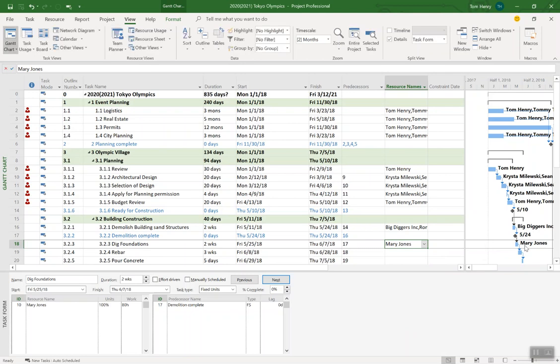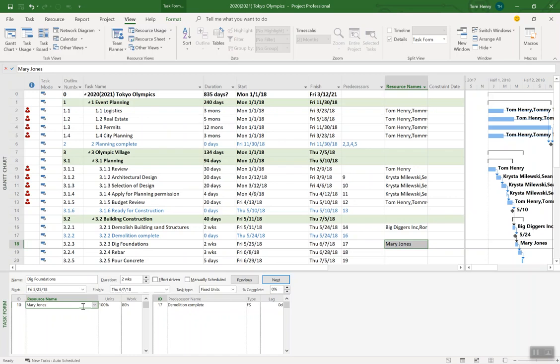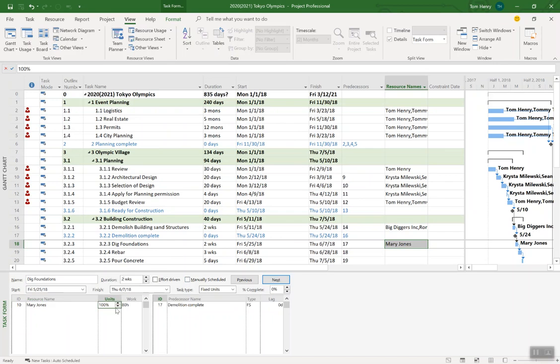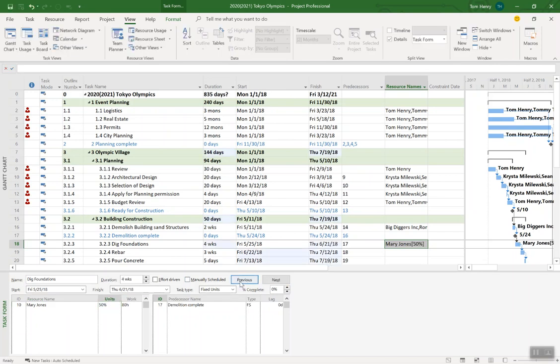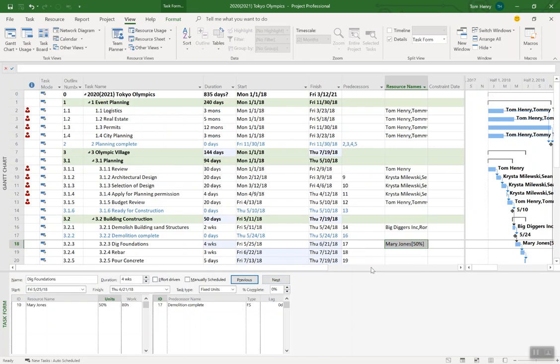She's actually gonna be assigned full time to work on that project. You see down the bottom here I have this little widget, it's called the task form. It allows me to see all the different variables that I've set so we can always see that I already had a duration set for this task, units, work. If I want to adjust this I can say, well I didn't want her to work part-time, 50% units. There we go, we can see she's now 50% working on that. What I actually did is push out the duration. Used to be two weeks, she's only working 20 hours a week now as opposed to 40, so it adjusted the duration for me based on the units.